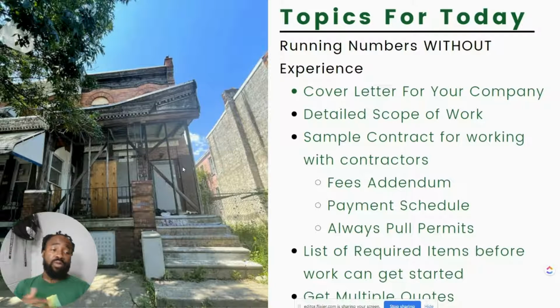And what I really enjoy doing now, because it saves me on writing checks, is explaining how you pay. I recommend you explain how you pay. You can say, hey, listen, we pay through ACH payments. It's free for you, it's free for me. It takes about 3 to 5 business days to get to your account. So we need a blank check and an authorization form so that we can put you in our system. Once an inspection is passed, we'll send that payment. You'll be notified that it was initiated, and then you'll be notified when it hits your account. That's it. Payment schedule.